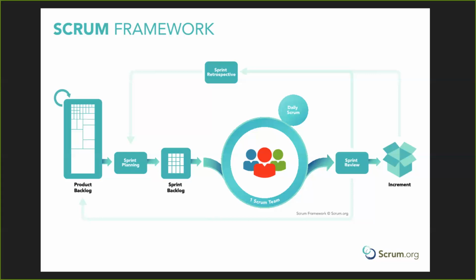So you build these up, and during sprint planning, each sprint you have a certain amount of time. Let's say the first sprint is going to be a week. Sometimes you have a choice over exactly how long it is, but you want at least a week. So rather than trying to implement the whole thing all at once, you try and figure out, okay, within a week, what things can we finish?